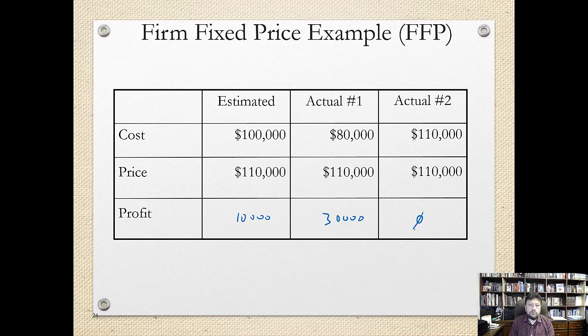Also, in a fixed price, in a situation where there's high inflation, you can also have an economic adjustment factor, which is based on the inflation rate, and that can be put in to make sure that you can still run a multi-year contract.